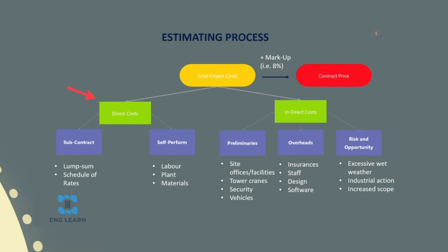The first step in the estimating process will be to determine direct costs. Direct costs will always form the bulk of the project costs — usually over 70 percent of the total project costs will be direct costs. To determine our direct costs, we'll need to develop our work breakdown structure and determine all the work required to complete, develop our delivery solution — so work out how we're going to complete the works — then quantify the costs for each scope item: the labour, plant, materials and subcontract costs for each of these.